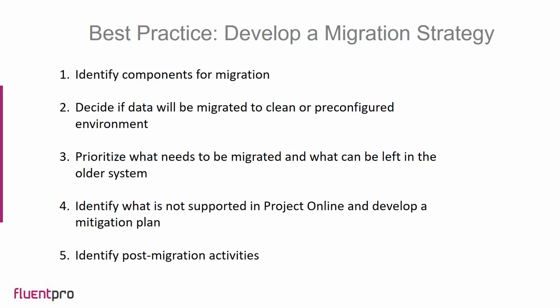There can be fewer or more fields in a pre-configured environment, but for those fields, for example, for which values will be migrated, their names should be exactly the same in the source and target.